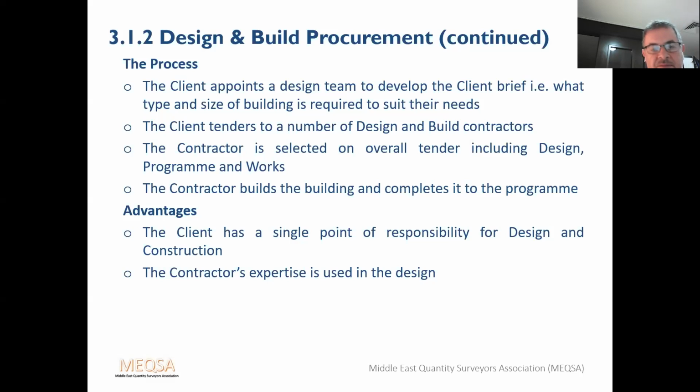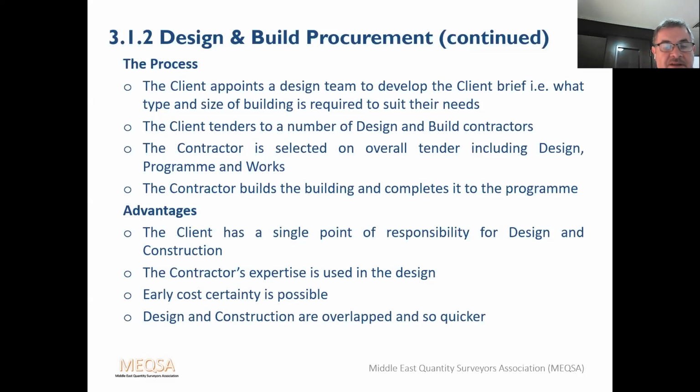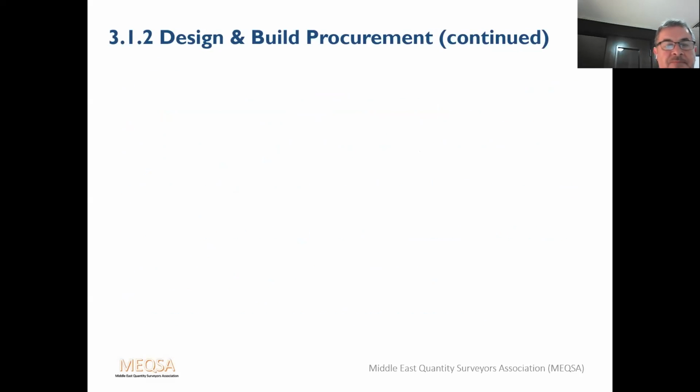An advantage of D&B is that the client has a single point of responsibility for the design and the construction. And the contractor's expertise is used in the design. Early cost certainty is possible, and design and construction are overlapped and so quicker. The disadvantages of D&B.